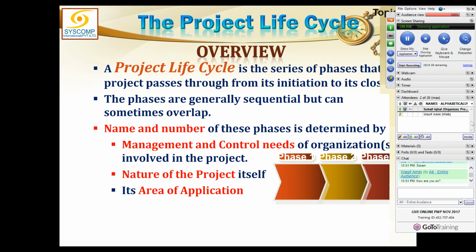If you find that some of the things have to be overlapped, then probably you should not make them phases, because two phases cannot be done simultaneously. I mean to say, you cannot start two phases together. The only possibility I can give you is that one phase is still not complete and you are forced to start the next phase a little earlier. But if you say phase 2 and phase 3 have started simultaneously, then I will have a major objection to that. So this is one part, how the phases should be made.